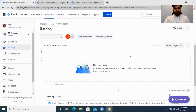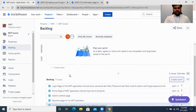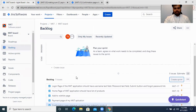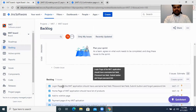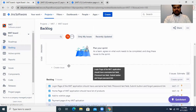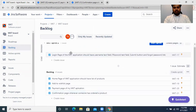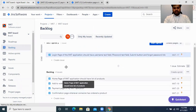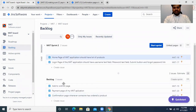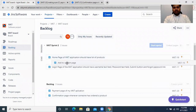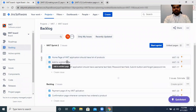Can you see an option here called 'Create a Sprint'? I just need to click on it, and the moment I click on it, it will ask me to plan my sprint. I just need to drag some tasks that are present in my product backlog to my current sprint.